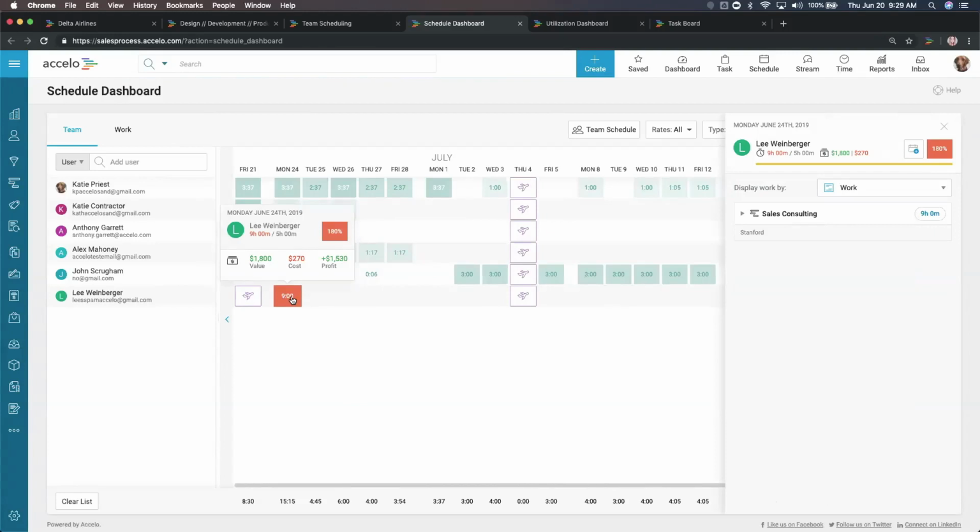In this example, Lee is only available to us for 5 hours a day. He's actually a part-time employee in this environment, yet we have him booked on over 9 hours worth of work, so we're obviously going to have to get him some help on that sales consulting stuff that he's working on.